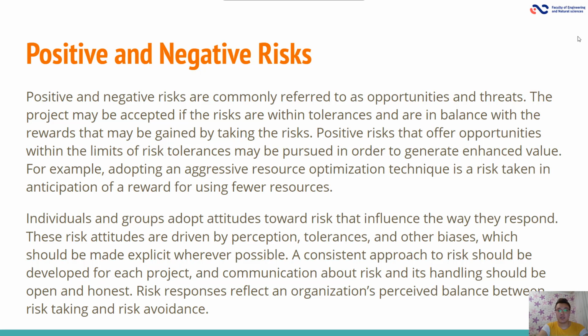Positive risks that offer opportunities within the limit of risk tolerances may be pursued in order to generate enhanced value. For example, adopting an aggressive resource optimization technique is a risk taken in anticipation of a reward for using fewer resources.